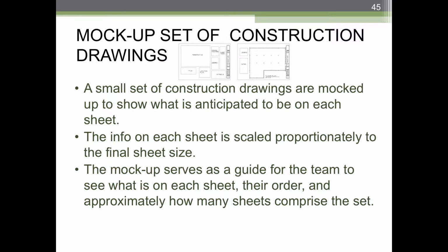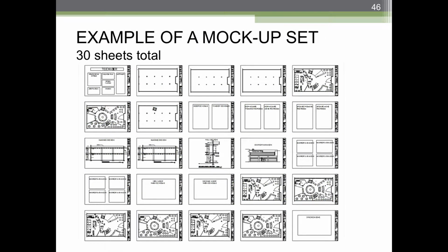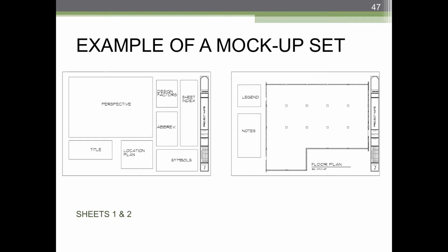Often, what will happen in an office is you'll mock up the drawing set, just to kind of know what you're up against. This is something which, when we are done with design development, we will do one of these for our construction drawing set. It's super handy, particularly as a management tool when you're in an office. If you want to say, okay, I have 3 people working for me, who's going to do what, and how long is it going to take each of them? This is a handy way of strategically organizing things.